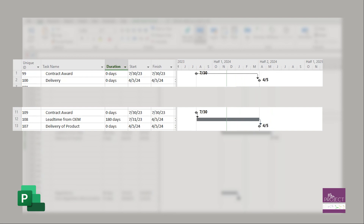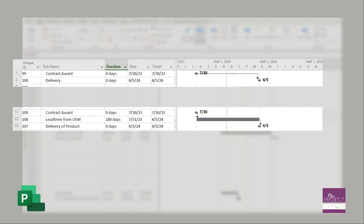Looking at the schedule on the right side, you ask: why is it out that far? What's going on in between? If you actually put in a task that says what that lag is, then viewers can see it — they can say 'oh, it's that lead time, this is what's going on.' It's a visual representation to help your stakeholders understand why there's a gap between two tasks, because they can't see the lag.